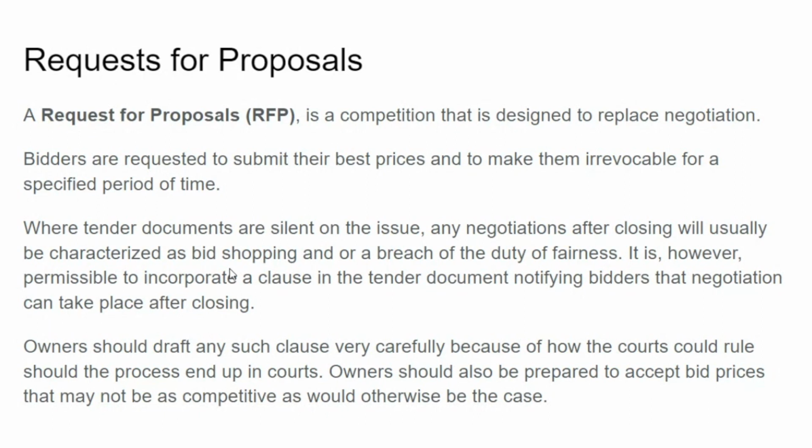So a request for proposals, again, is a competitive tender process that's designed to replace negotiation. Bidders are requested to submit their best prices and make them irrevocable. In other words, this is a quote that's good for 30 days, meaning you can't say, oh, sorry, that's off the table.